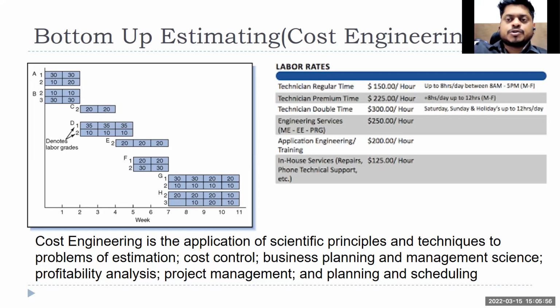They will look into the opportunity of where to get that money and what the schedule of payment will be. Because if I am taking a loan from a bank, again I have to pay that back to the bank. When should I take that loan from the bank? How much money from my cash reserve should I use? How much loan amount? What is the ratio of cash reserve and loan? Those are activities where, as a project manager, you might not have that knowledge. So the finance manager in your team is going to help you.